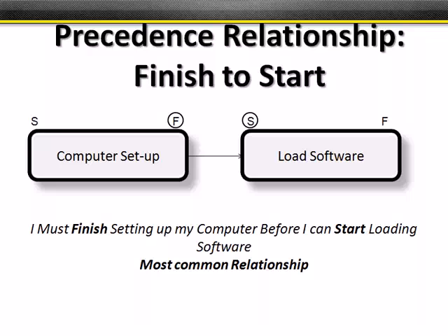The most common relationship is a finish to start. That means the first activity needs to completely finish before the second one can begin. So if I go out and buy a brand new computer in a box and I buy software brand new, both are in boxes. Can I load the software before I finish setting up the computer? I can't. It's not logically possible. I must finish setting up the computer before I start loading the software.